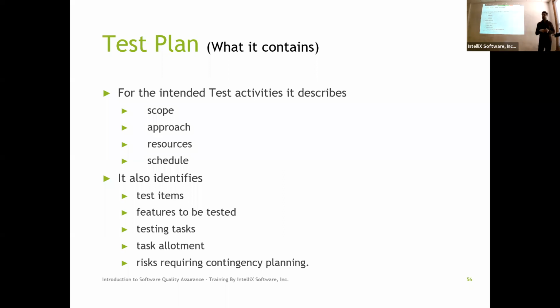Now, if you come through and say, hey, developer, give me this date, you need 3 weeks, so I'm going to make a commitment to the client that we'll deliver software on this date. Great. What happens if the software development team does not deliver you code until only 1 week is left?